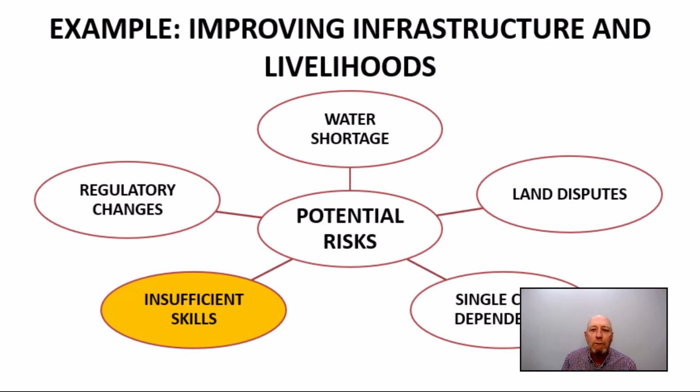Strategies could involve both qualitative assessments of local workforce skills and quantitative measures such as training programs to enhance skill levels. The likelihood of unforeseen regulatory changes is low based on the current regulatory environment. However, the impact would be high as any change in the regulations around our project work could lead to potential disruptions to project plans and funding. So although the likelihood is low, the impact on project plans and funding makes this risk a moderate priority.